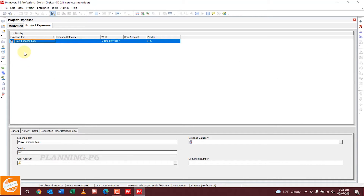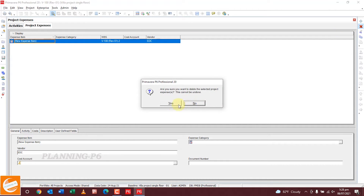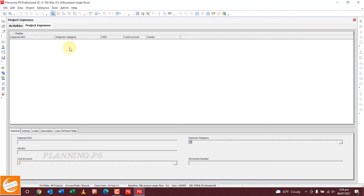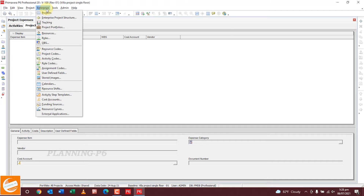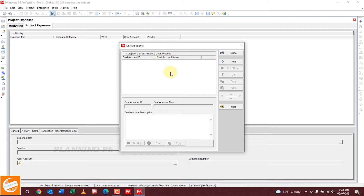Here are the expenses items and special items. We will add new items here. But first of all, you have to create an account for your cost. Go to Enterprise — before adding your expense you have to create a cost account where you are depositing your vendor account or whatever. You have to create that here. There is the cost account option — open it. Now this window will open to add a cost account.